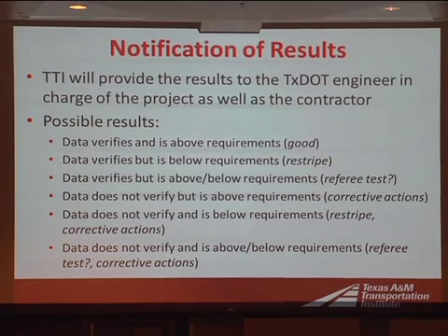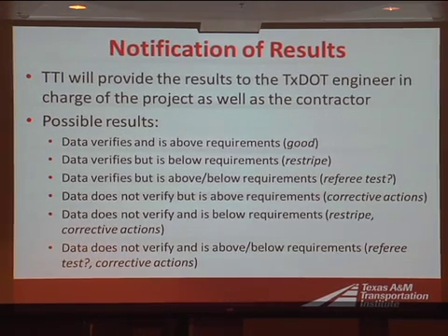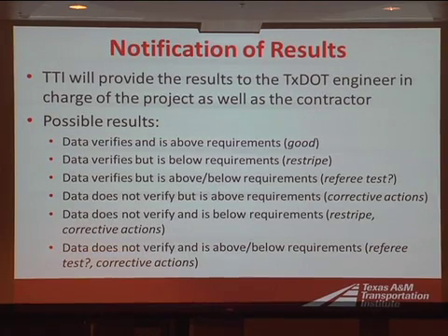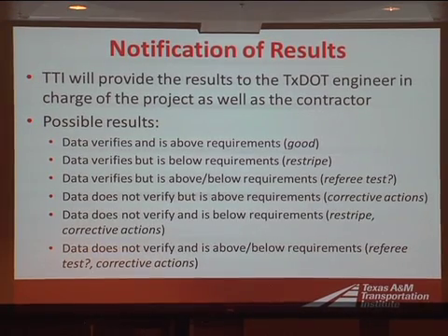And then when the data doesn't verify is when we have some more issues. If the data doesn't verify but it's above requirements, well, at least they met the requirements, but the data that they're collecting is not good. So how reliable will that data be in the future? How reliable will that contractor be in the future? That's where some corrective actions may need to take place to improve their data collection in the future.